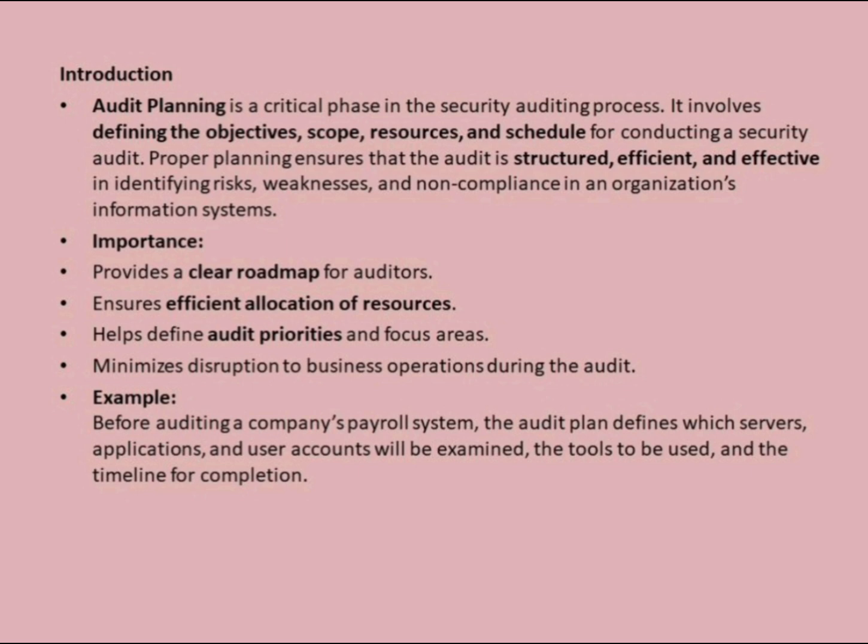Minimizes business disruption. Scheduling audits thoughtfully ensures that normal operations continue smoothly and sensitive processes are not interrupted. Example: scheduling audits of payroll servers outside working hours to avoid affecting salary processing.